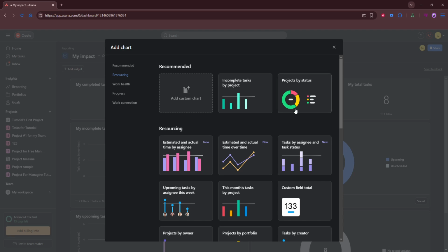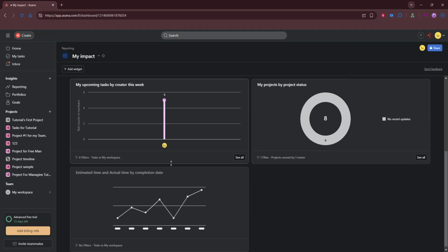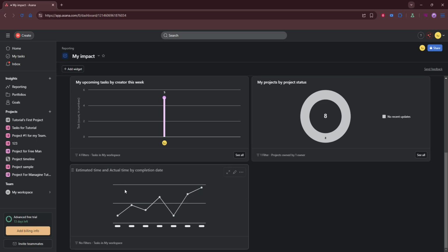Finally, share or revisit the report to monitor progress over time. Share it with your team so everyone sees the same source of truth and clarify who can view or edit. Revisit the report regularly. Weekly or bi-weekly works well to track trends, celebrate wins, and catch risks early. Consistency is key. Using the same report over time builds a reliable history that makes decision-making faster and easier.